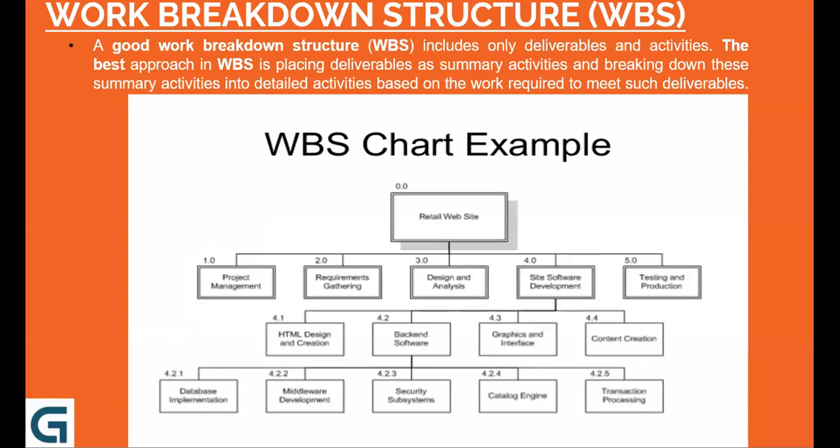The next branch is coming from backend, that is the database we were talking about. There we have what security we're using, what middleware we are using, what the hardware configuration of the database is, and things like that. And you could see the naming convention or versioning keeps changing. From 4.0 we had a branch, it becomes 4.1. When from 4.2 we had a branch, it became 4.2.1, things like that.